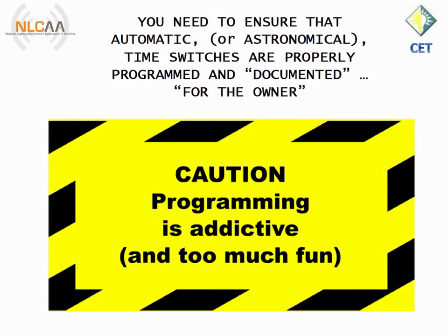Surprise! Automatic time switches must be programmed prior to the arrival of an acceptance test technician. If the timer is an astronomical time switch, it must be told where it is located on planet Earth so that it can predict sunrise and sunset.